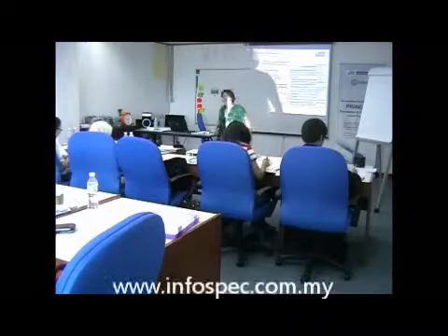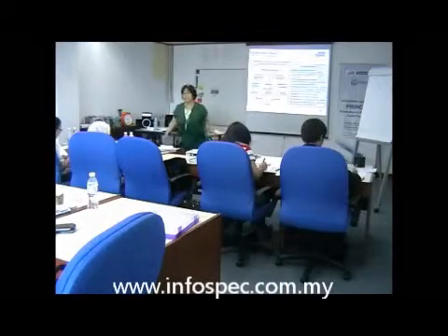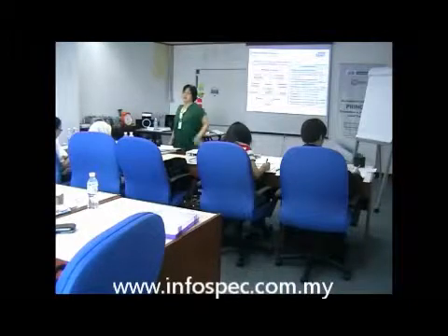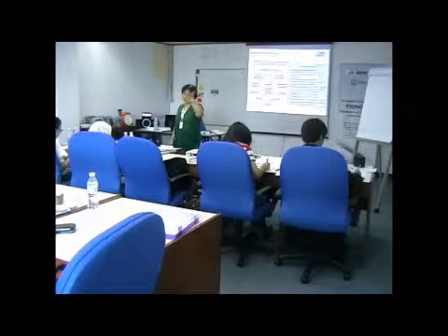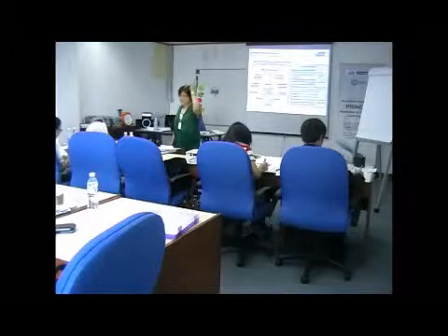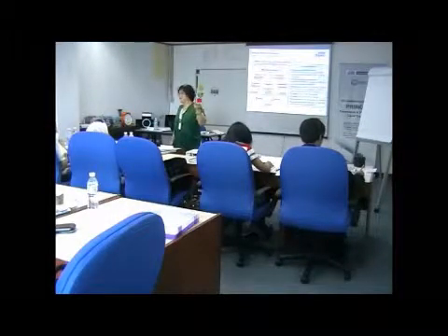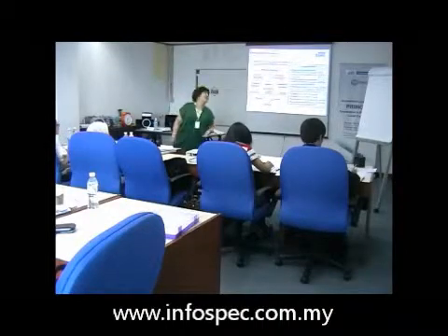Okay. What are project products? All your output, your specialist output, and also your project plan, your business case, the project product description. Yeah, the management products. Okay, so you want to track that as well.